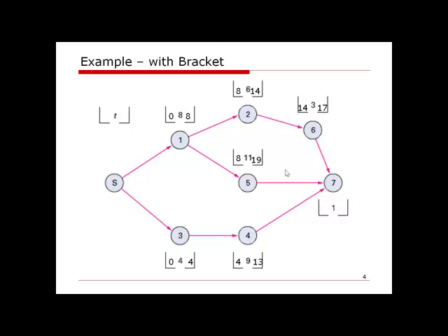So here are activities 4, 5, and 6. Since these three different activities have different early finish times, which means they will finish at different times, activity 7 cannot start until all three activities are done. We need to wait for the one that takes the longest, or finishes last, before we can start working on activity 7.